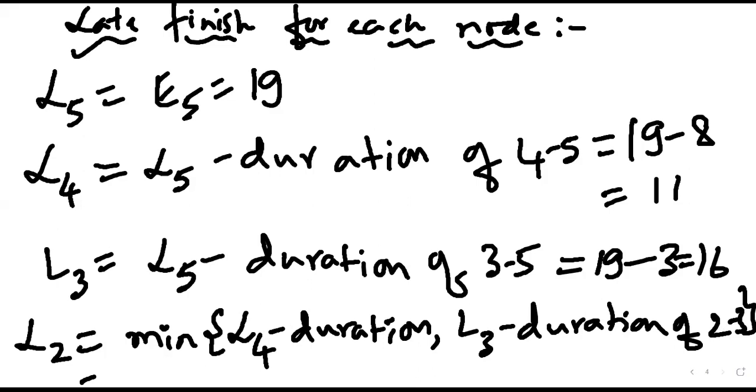So what will be the answer? L4 minus duration of 2-4. L3 minus duration of 2-3. Only that we are coming in the reverse direction now, from the last node to the first node.